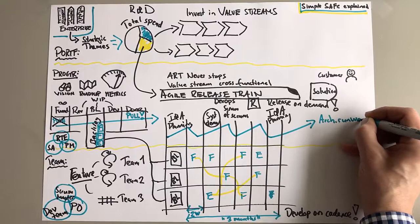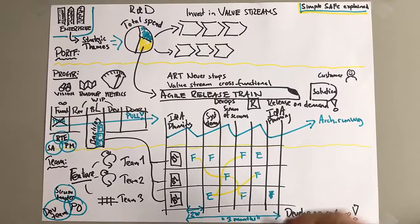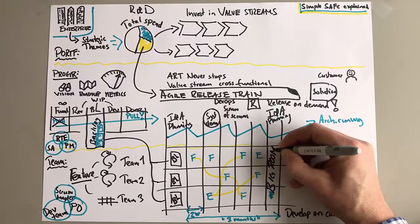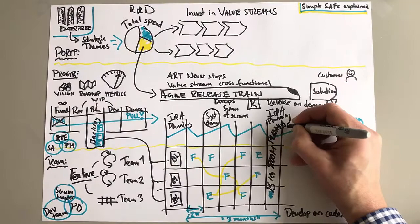Now another important thing that you would have to look after on the program level - the architectural runway. Now the teams are building features, but they're also building enablers. And the enablers, that's what's going to enable us to build new features in the future.